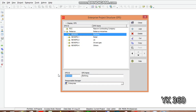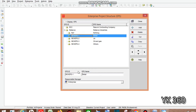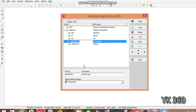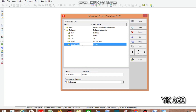We can also change the EPS ID here. For short reference IDs we'll use: Refine, Retail, Geo, O and G for Oil and Gas, and Others. We have successfully created five minor child EPS nodes under the parent Reliance Industries EPS.